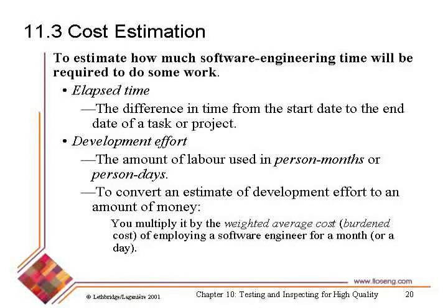If I have 5 people working for 12 months, that's different. Then I have 60 person-months of work, but an elapsed time still of 12 months. It's the development effort that costs us the money, and it's the elapsed time that causes us to make or break deadlines. And so both of them are important.